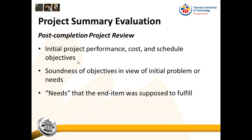Then we come to the project summary evaluation — the post-completion project review, or lessons learned session. You look at your initial project performance, cost, and schedule objectives. You evaluate the soundness of those objectives in view of the initial problem or need. You now have 20-20 hindsight; you know exactly what happened, what went wrong, and what can be improved. You re-examine your original objectives and decide to what extent you actually addressed the initial problem or need.